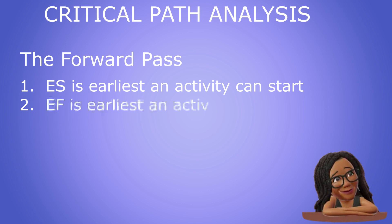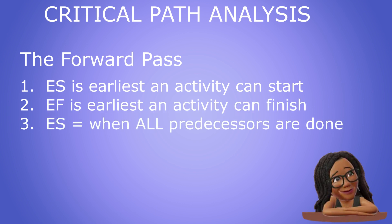As the name suggests, the early start of an activity is the earliest possible time in the project timeline that the activity may begin, while the early finish is the earliest possible time in the project timeline that the activity may be completed. Since activities must wait on their predecessor activities to end before they can start, the early start time of an activity is equal to the time at which all its predecessor activities are complete.